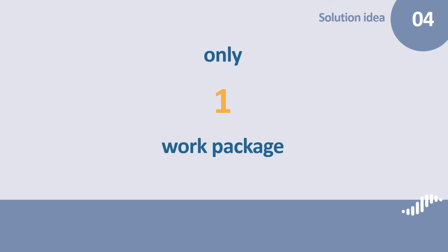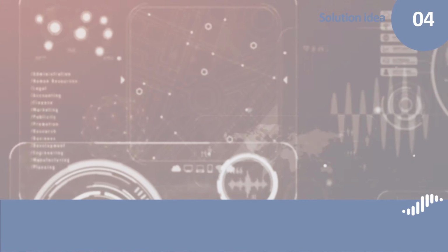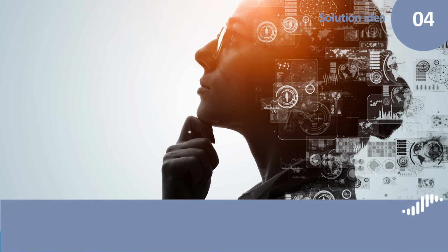Please note that you will have only one work package to prepare your solutions before piloting them. This implies that you need to know your area well before starting the project and that you need to know what has been done before in this area. Your project should not carry out basic research on what the solution can be.